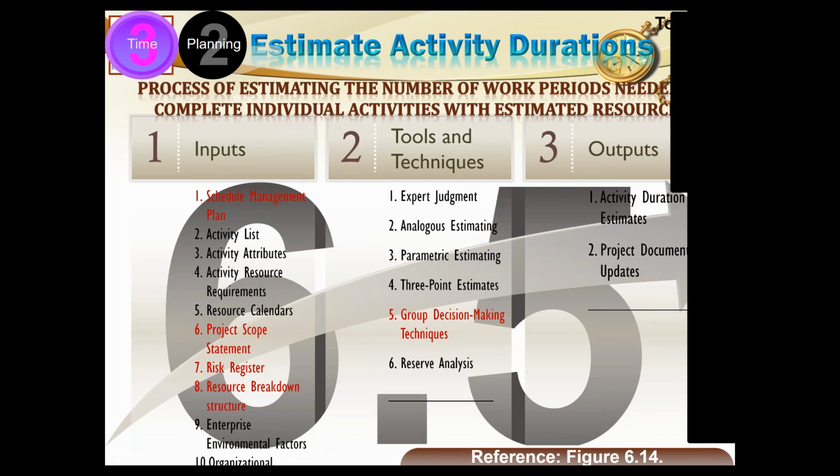And this job is very similar to that, and therefore it may also take 3 days. This I am creating an analogy. So what I have done is I have taken the analogy of a previous activity, and I have used exactly the same duration as we used earlier.